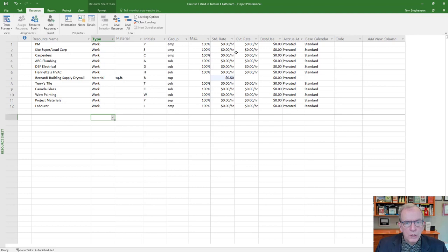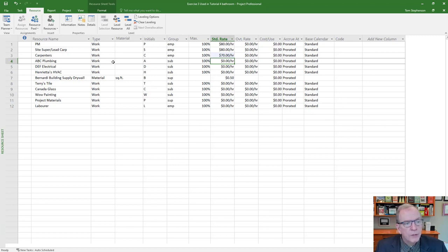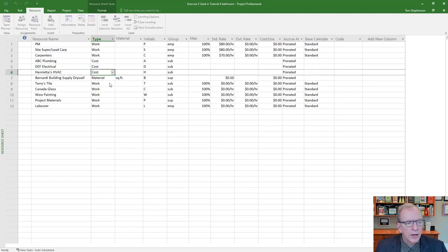So we've got here work, and I'm going to put an hourly rate, project manager. So maybe I'm going to put an hourly rate of $80. Site super, maybe I'm going to put an hourly rate of $80 as well. Carpenters, maybe I'm going to put an hourly rate of $70. And for ABC Plumbing, you know what? They're a subcontractor. So I'm going to contract that work out. I'm going to put them as a cost. Same with the electrical. Same with the HVAC subcontractor.